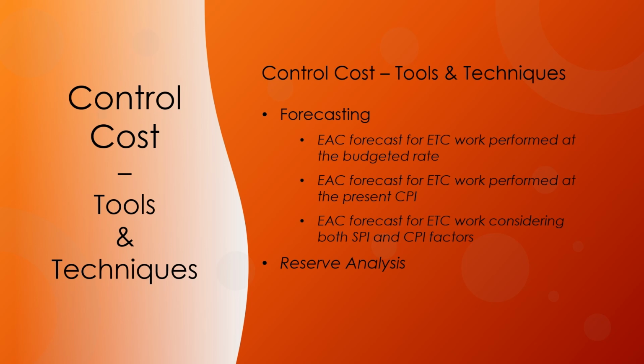If the identified risks do not occur, the unused contingency reserves may be removed from the project budget to free up resources for other projects or operations. Additional risk analysis during the project may reveal a need to request that additional reserves be added to the project budget.